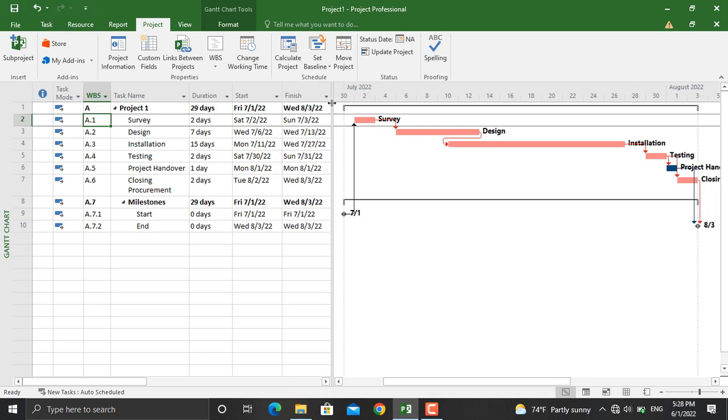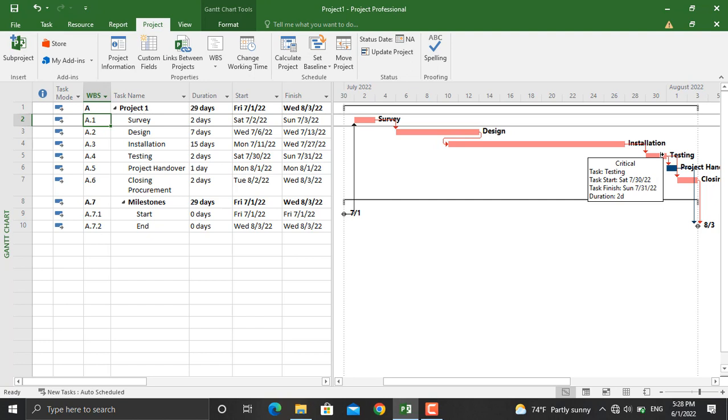Now when this is done, the next thing that you will do after assigning the resources, estimating the duration, giving leads and lags to your activities, the next thing you will do for your project in Microsoft Project is to assign a baseline.